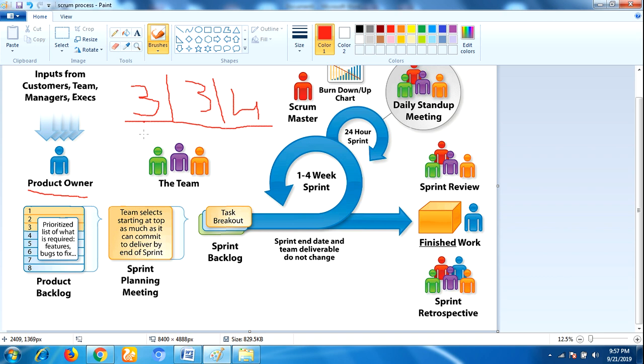These are the stories committed in sprint planning, and they also estimate the stories, how long it will take to complete each story. That is what we call story points. After committing the stories in the sprint planning, they will maintain one sprint backlog. This sprint backlog contains whatever stories they committed to.